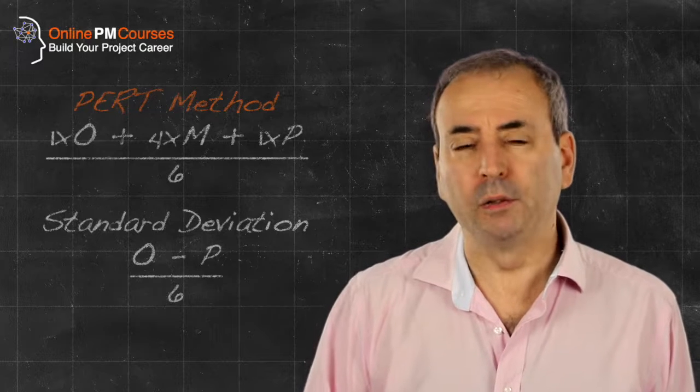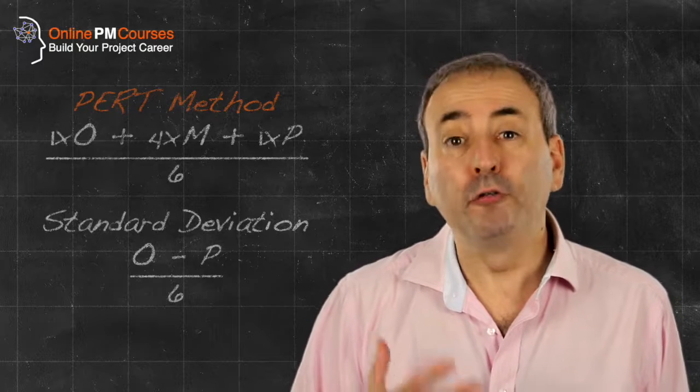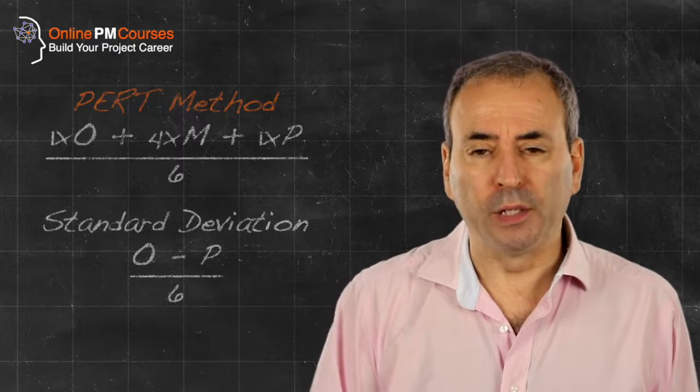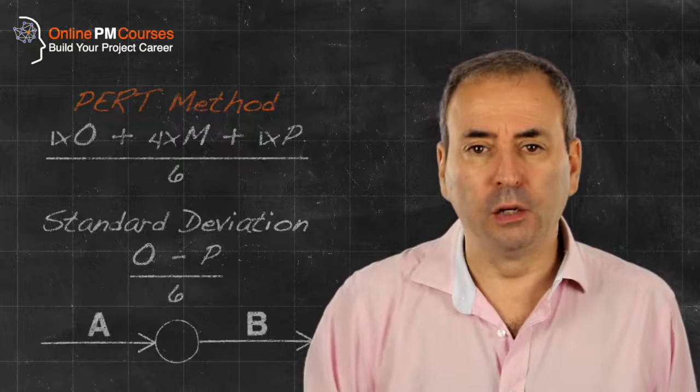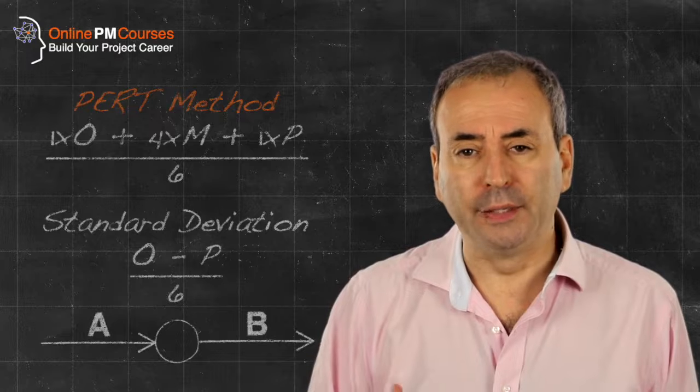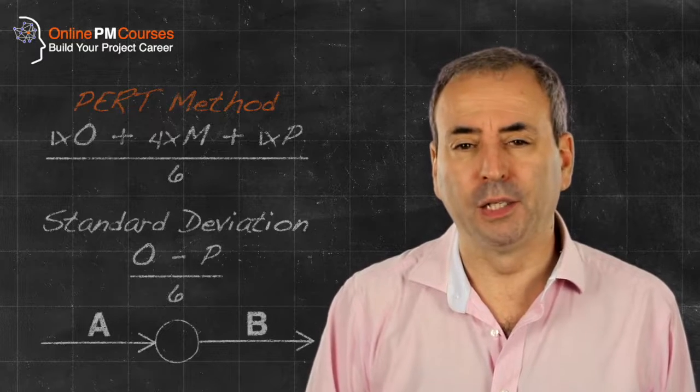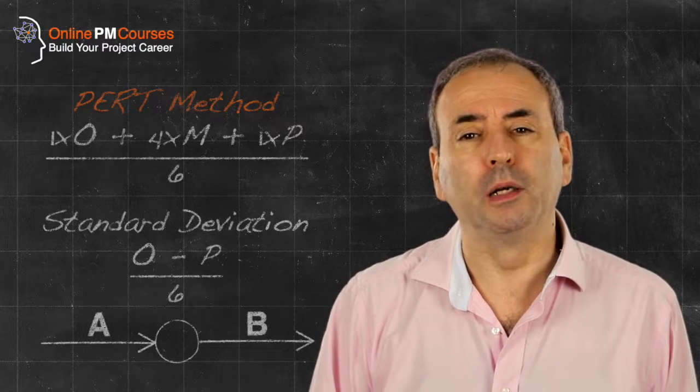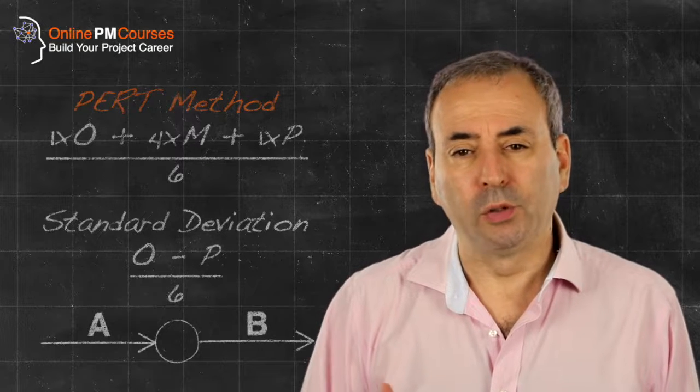So the PERT methodology is a way of estimating the duration of projects. Firstly, by building a network where the convention is that we use the arrows to define the tasks and the nodes show how the arrows relate to one another. And secondly, the lengths of those arrows, the durations recorded on those arrows, are based on three point estimates from which we can calculate average durations and standard deviations.